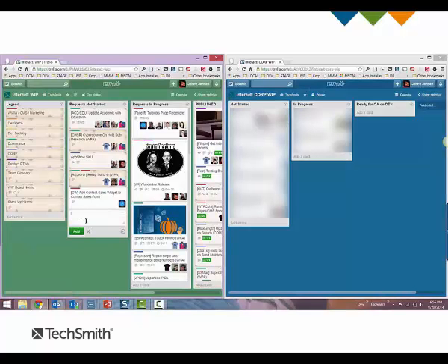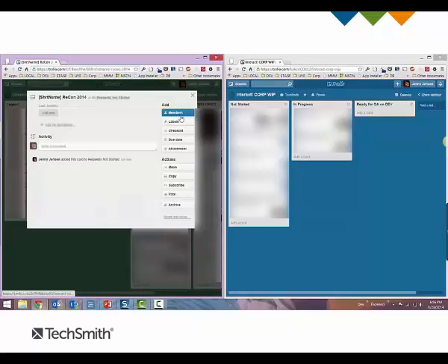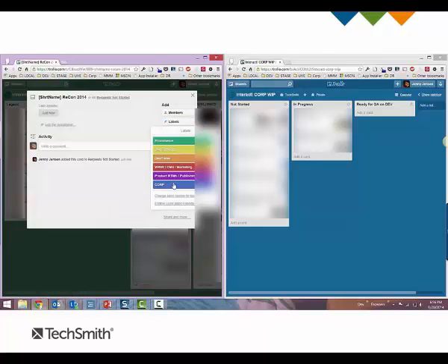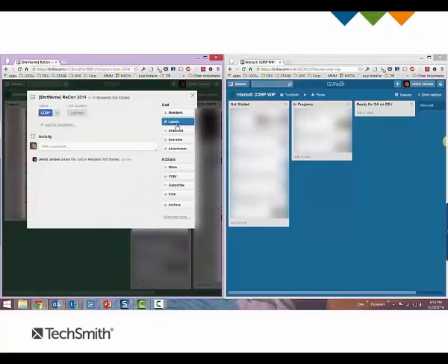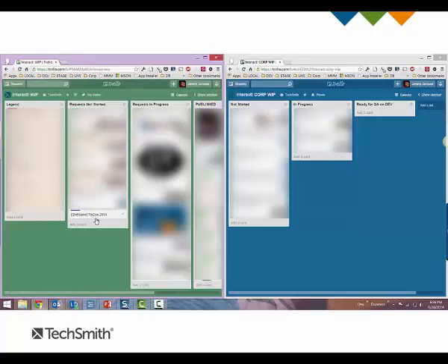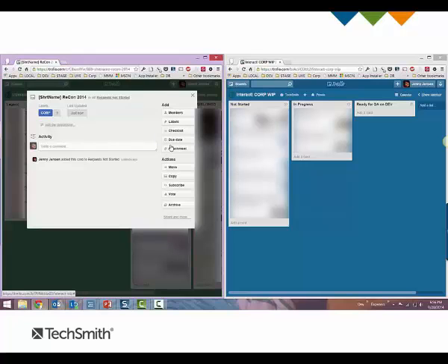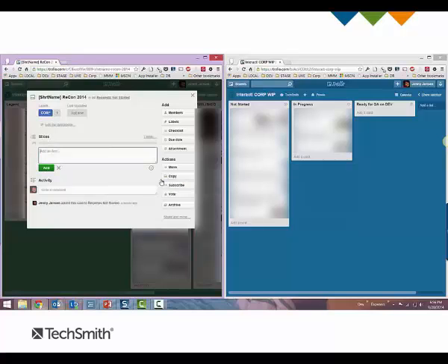So I'm creating this card in requests not started so that the script doesn't catch what I'm doing before I'm ready, because it will only run when it's in the in progress column. You'll see that I have created a short name in brackets. That can be anything you want because the script is actually looking just for the brackets and not trying to match what's inside the brackets. I've added a label and I'm adding a checklist, which I'm calling slices, because that is a required part of the script. Then I add a couple of slices here, and notice that I don't add the short name here because the script will do it for me.